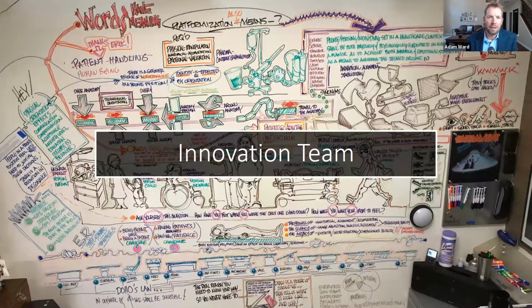The extended team would be functions that you need to create the new care model that you don't have. This could be mental health, could be pharmacy. You can think of a lot of different areas where you would want a role or a function pulled in that needs to have representation. Then the last is the ad hoc area, and these would be people less than 20%, and they may even be in a meeting every couple of weeks, but without their input, whether it's an EMR representative or a different area, you want to have that pulled in. Those should be defined. There should be names, and there should be check boxes next to those names when they are in those roles and working.